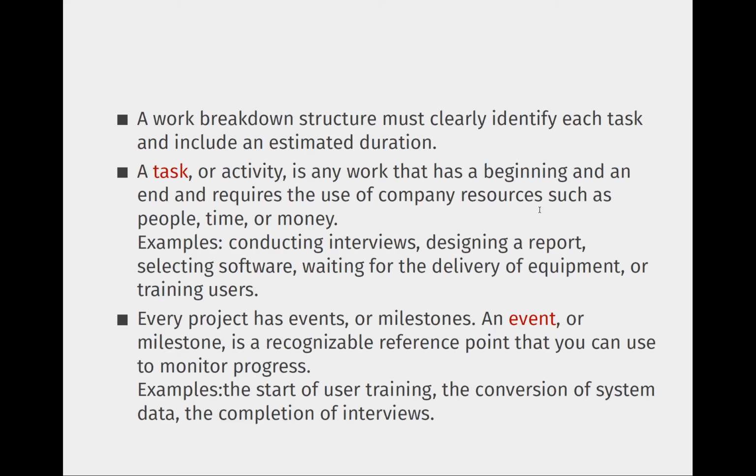A task or activity is any work that has a beginning and end and requires the use of company resources such as people, time, and money. For example, when you say conducting interviews, you can have a rough estimate of how much time you are going to spend on this. Then you have events or milestones. An event or milestone is a recognized reference point where you monitor the progress, right? Examples are the start of user training, the conversion of the system data, and the completion of interviews.